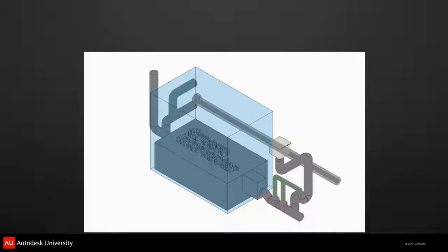We've got projects where the mechanical piping VAV boxes were modeled at the design level, and they routed all the piping up to it and connected to it. And the box that was actually delivered on spec on the job had the taps coming off the other side.